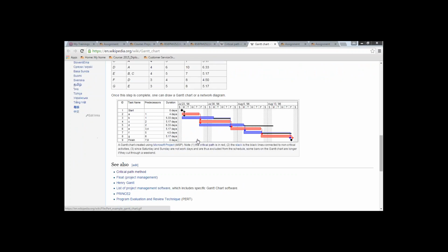So you can get a visual representation of when things are happening and when things are not. I guess the difference between the Gantt chart and a critical path analysis is that the critical path schedule shows the dependencies between different tasks. The Gantt chart usually just lists the timelines of when things are happening. Things can happen at different times.